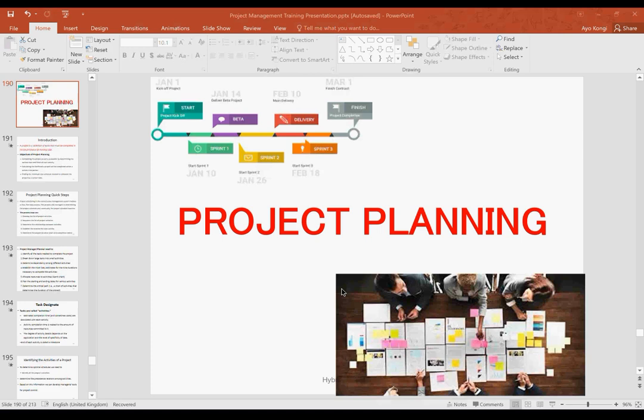After you've listed out all the activities, the next thing to go through is called sequencing activities. This is where you start saying, okay, what follows what? What do we need to do before what? Okay, Tolu, I know you said add salt. Oh, Mandy, I know you said blend pepper. But before all of that, we have activity A, B, C, D, E, F, G, H, whatever. So at that level, we can now say, okay, let us sequence our activities.